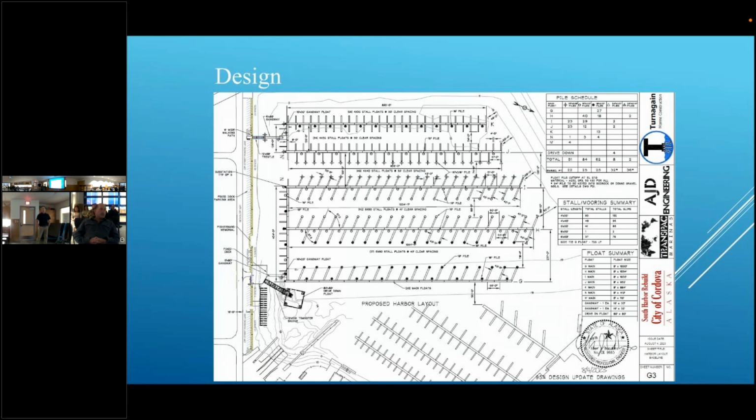Did you keep close track of how this budget creep happened? How did you go up by a third, another $10 million? The initial estimate on the original design was $29 million. Inflation hit us, and the contract costs went up $10 million in just a few years. We cut back, and we still ended up at $39 million. It's an interesting topic to see how it happens.